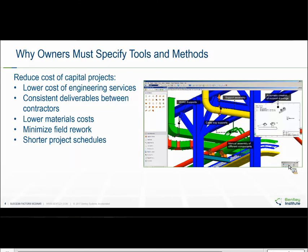This productivity also supports shortened schedules. Today, this also requires tools that allow collaboration between members of distant teams — global work share. In today's joint venture and design-build scenarios, it's common for multiple contractors to contribute to a plant modification. A consistent set of design information contributes to the shortest schedule and lowest cost. Common material specs and reporting formats across all contractors allow material requirements to be procured at the lowest possible cost. Reporting on long lead items earlier in the design process shortens schedules and lowers material costs.